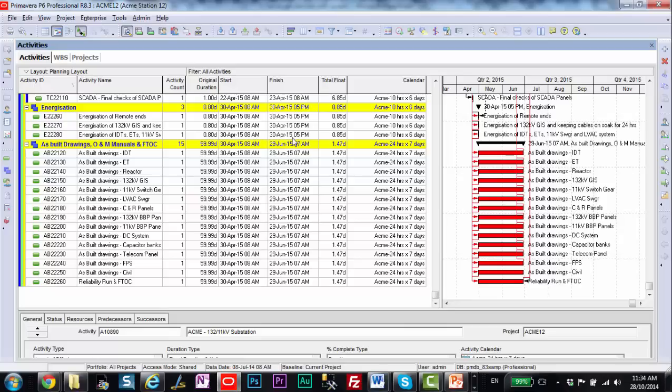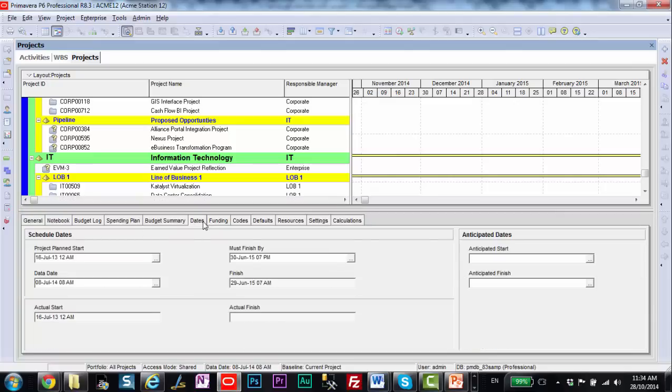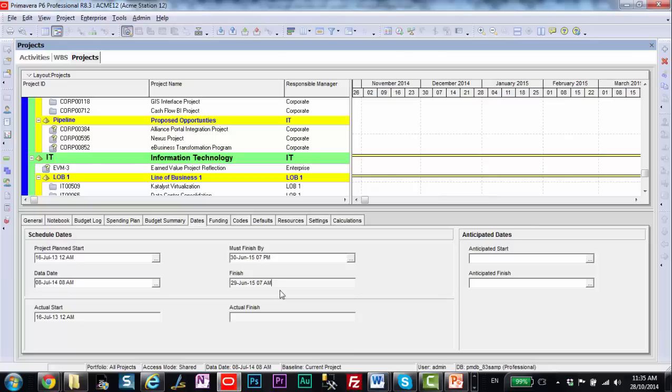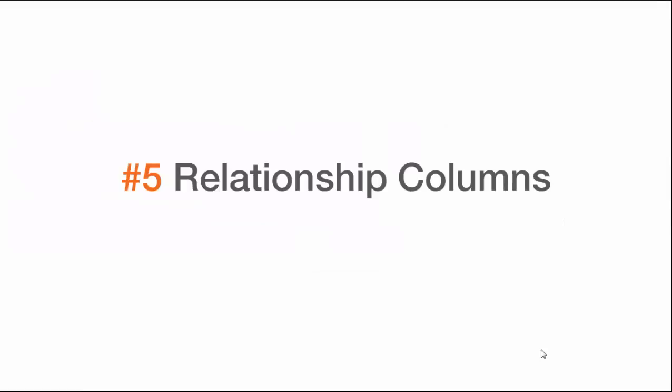Here we have activities finishing at 5 p.m., starting at 8 a.m. But here we have activities that are finishing at 7 a.m. And what's going on with this 1.47 days of total float? Back here in the projects view where I'm looking at my project and I'm looking at the dates tab. If I look at my must finish by date now, the project must be finished before 7 p.m. on June the 30th. And it in fact is finished at 7 a.m. on June the 29th. So that accounts for 1.47 days of total float. It's the difference between June 30th 7 p.m. and June 29th 7 a.m. Primavera has turned that number into a fraction. So if you need to analyze things at a detailed level, it's a great idea to turn on those decimals as well as to turn on your time stamp.